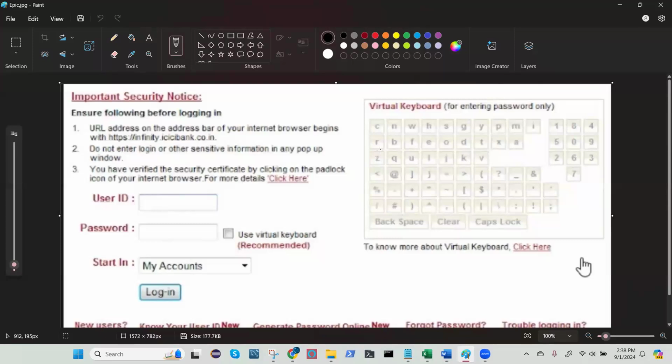Okay, that's what I told you about who is going on vacation, how many we are in the team, our team capabilities, how we are able to develop this in a timely manner. We have only a sprint of 2 weeks. So each day, how much work are we able to commit in our project? Typically in Agile, we have the term epic, or a feature. That means we have 3 epics: develop login module, epic profile, and so on. When I say epic, it is a high level requirement which we need to achieve. So for our project, we have been given 3 high level requirements.